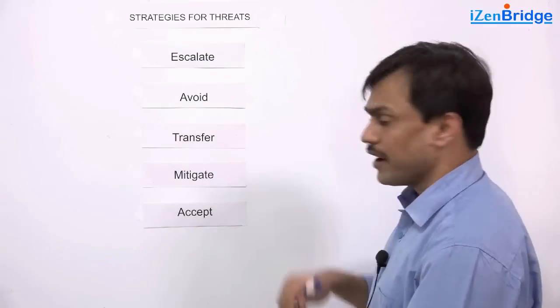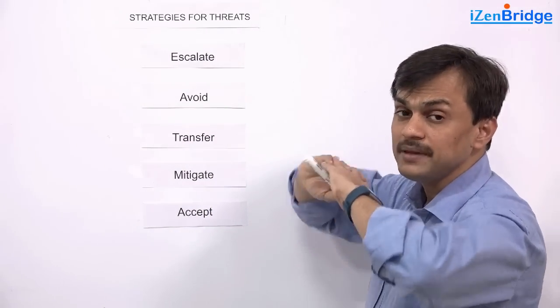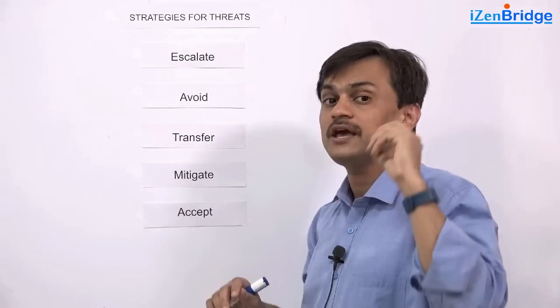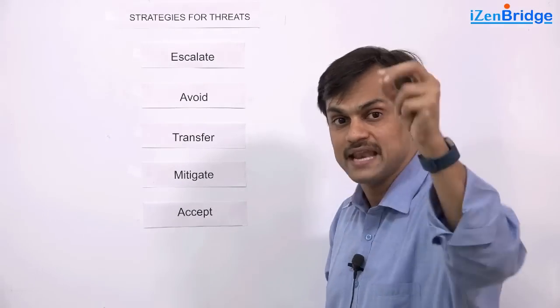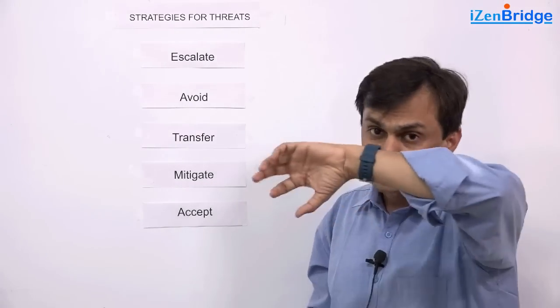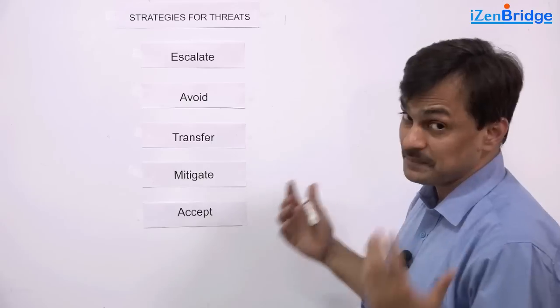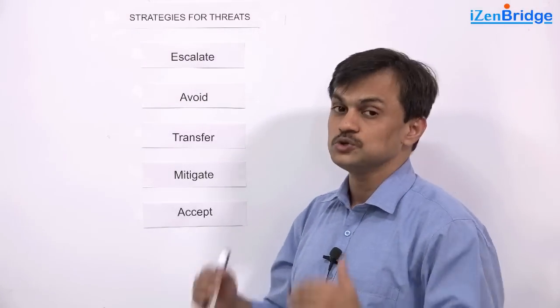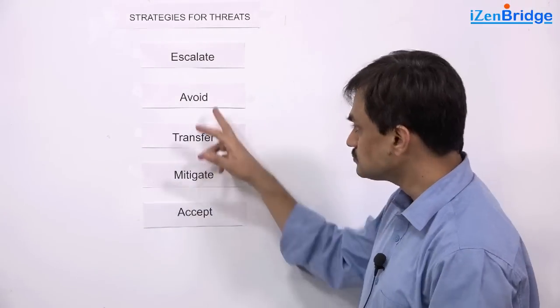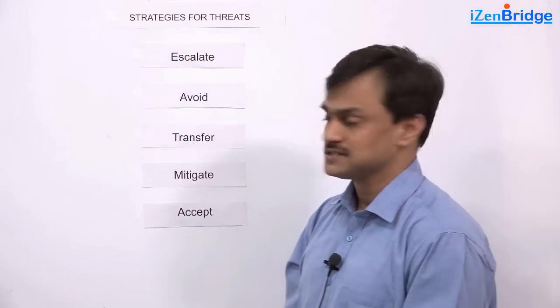When we look at avoid, avoid is either we make impact zero or we make probability zero. Means the risk doesn't remain risk anymore because we remove the roots of it. And may not be possible for every risk but it might be needed for dangerous risks. You try to avoid them. You don't do that option which becomes risky.